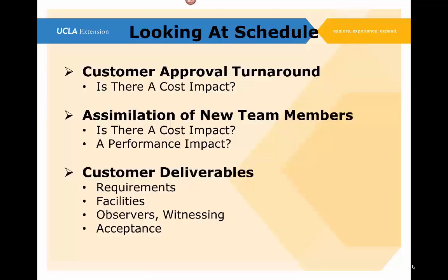Several of my most recent projects, I worked very close, bore sighting in on the customer, looking them right in the eyes when we were sitting down and getting agreement that the customer will turn around our documents through their review cycle within 2 weeks, and we'll have them back within 2 weeks, and therefore we can get through any revisions or anything like that and having them back for a signature within 1 week later. So we can put that time, 3 weeks, into our schedule to know how long it'll take before our deliverable is complete, signed off, approved, accepted.